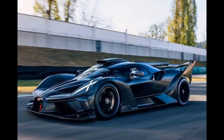Vendor selection. LJRC considers their budget, $325,000, and desired performance level. They need the engine delivered by July 1st to meet their project timeline. Vendor B's engine offers a good balance of power and cost, aligning with their project goals. Their 10-week lead time ensures on-time delivery.